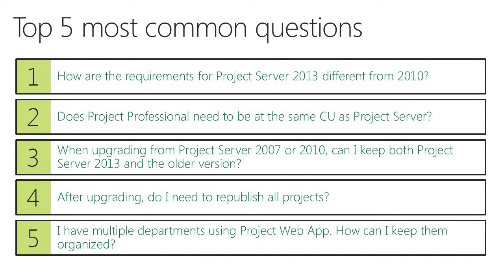Well, there's a couple of different ways of doing that. One is more a security standpoint. If you've got a requirement where people in one department can't see the projects from another department, that would be handled with security categories and groups, where you'd have a security group for each department, potentially more than one, depending on what you need to do. There'd be a team member group, a project manager group and a viewers group for each of the departments, perhaps. That would entirely depend on your security requirements and how secretive your departments are amongst each other.